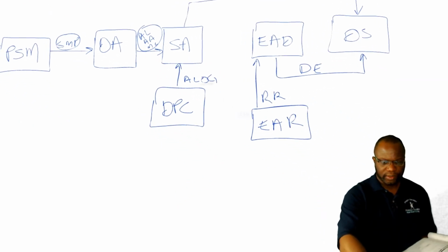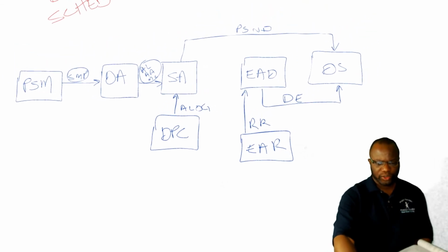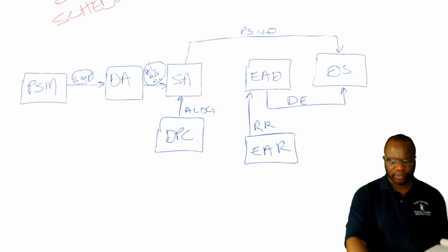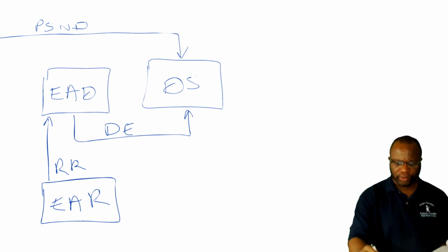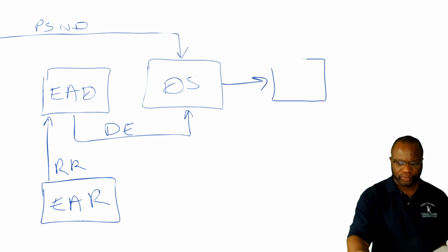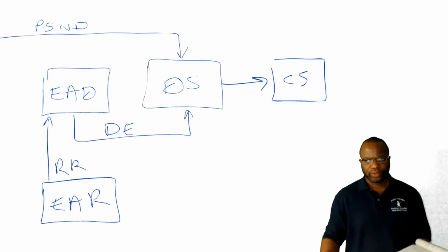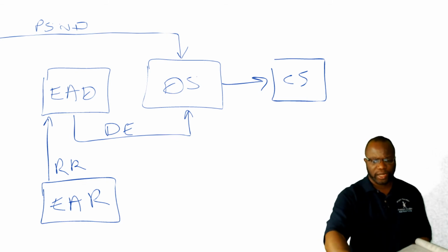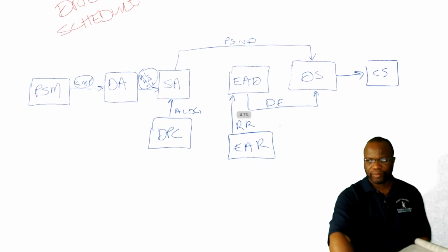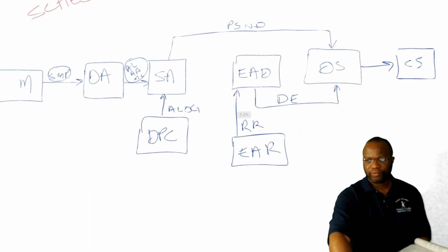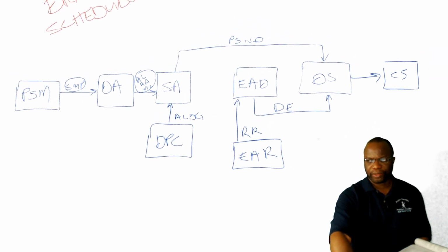So, my friends, you can see how the picture is unfolding. We have one more to talk about, and it's very straightforward. The final one to talk about here is none other than control schedule. And in control schedule, what you're doing is you're monitoring and controlling the schedule. You're checking to see if things are what they should be. Did you start at the right time? Did you end at the right time? And did everything happen as it should? And if the answer is no, it didn't happen as it should, then you need to do something to get your project back on track.